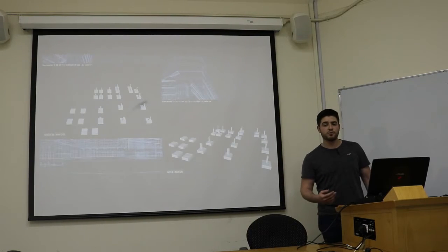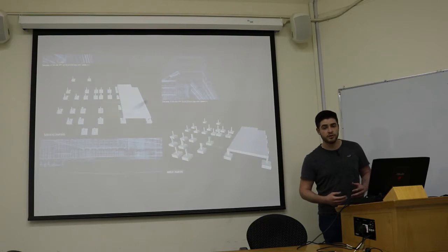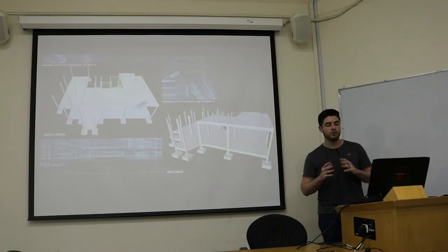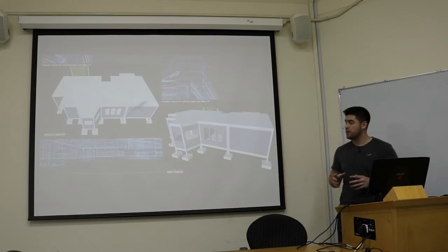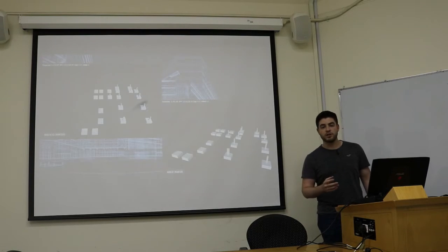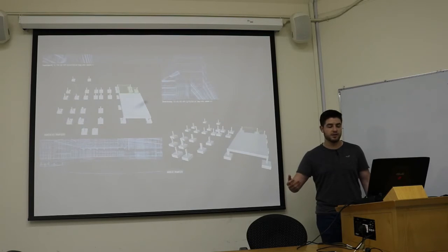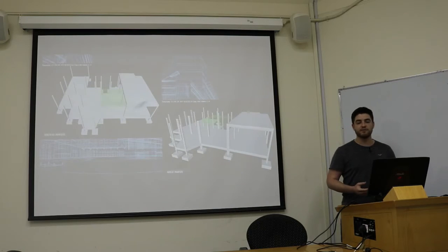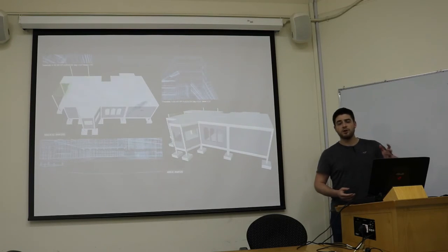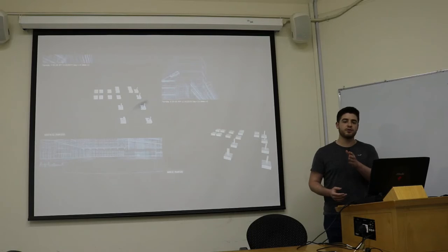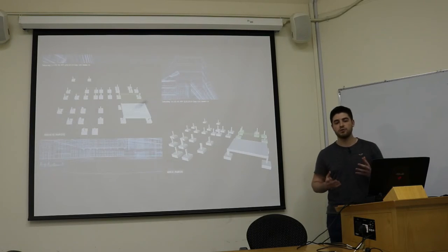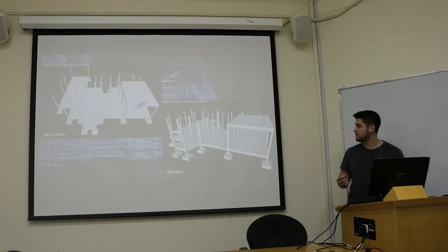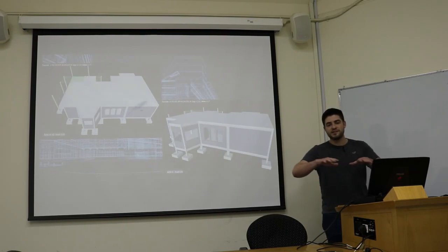Finally, using Navisworks, we integrated the Revit model with the activity network, providing the following sequence of work. Now, this was done not only to check the logic of the activities that we chose, but also to make sure that no column is raised before its preceding foundation, for example. Now, it also helped us in detecting any incorrect inputs when it came down to the durations or the beginning and start dates. This was because that, for example, we didn't want a floating slab to appear.